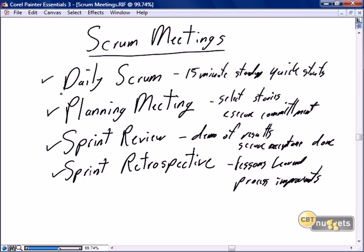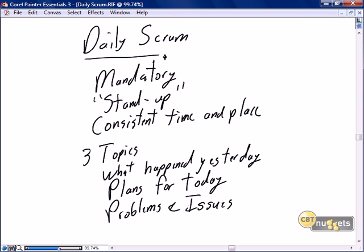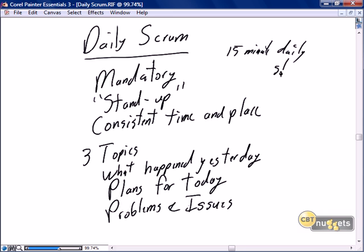Let's dive in and have a look at what happens in the daily scrum. The daily scrum is the most commonly discussed, most commonly known meeting that we have within scrum. This is our 15-minute daily stand-up, where all team members get together to discuss the sprint.